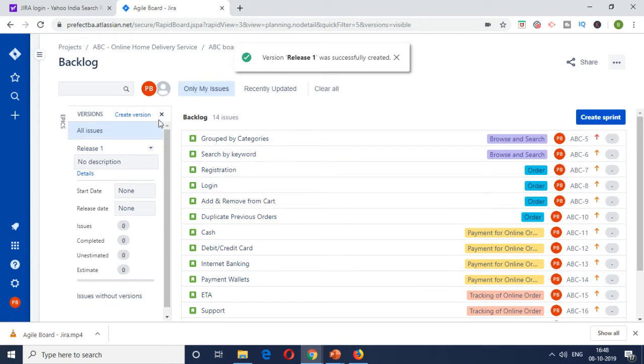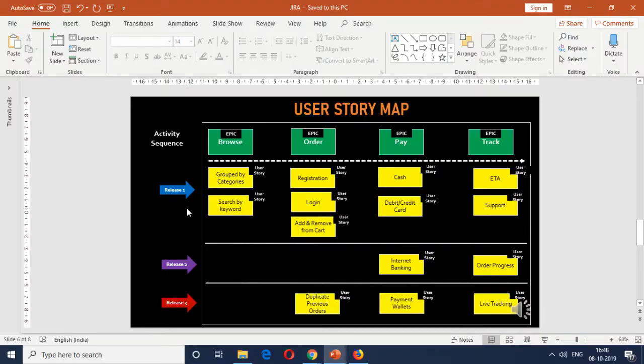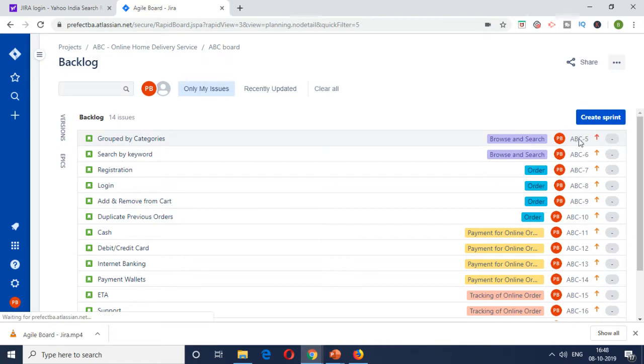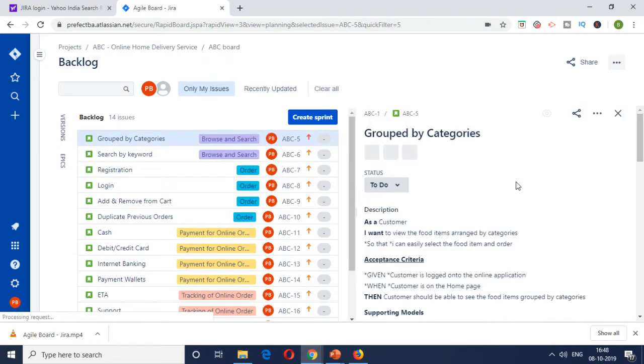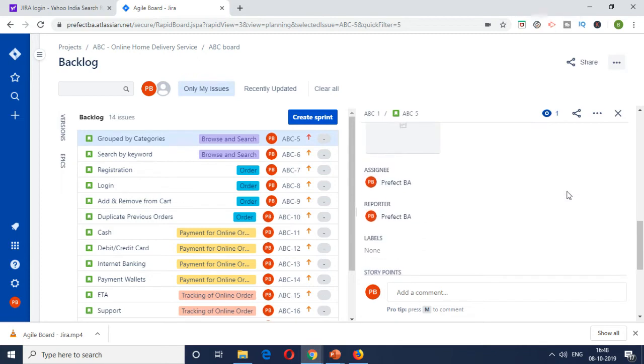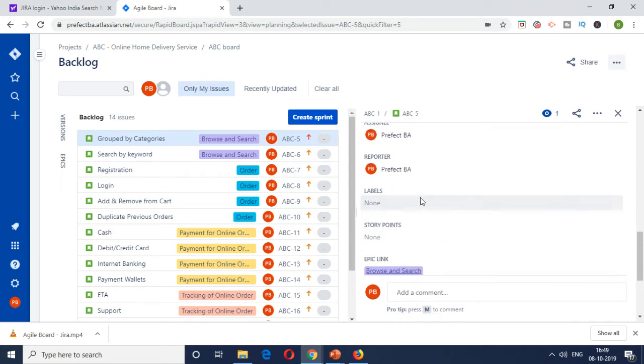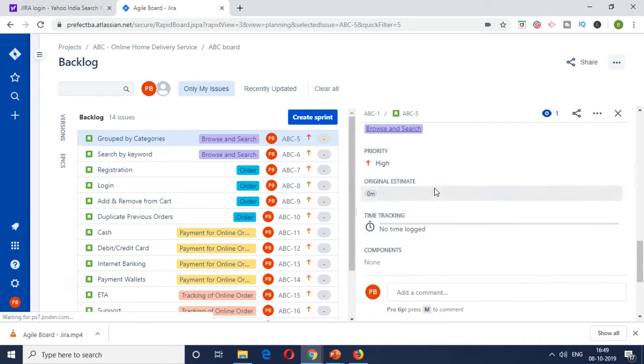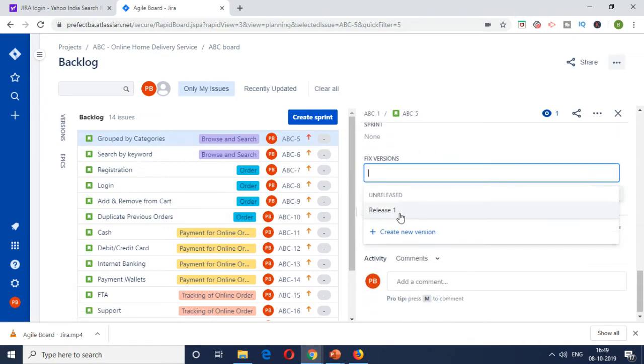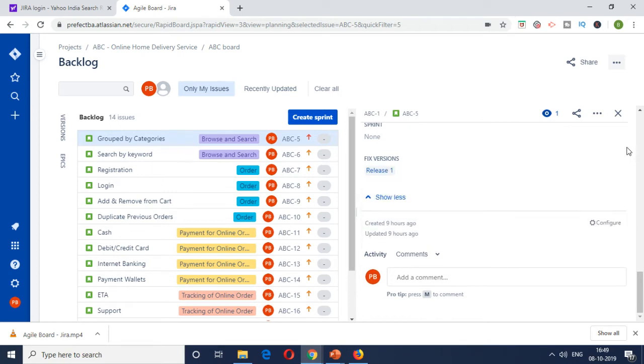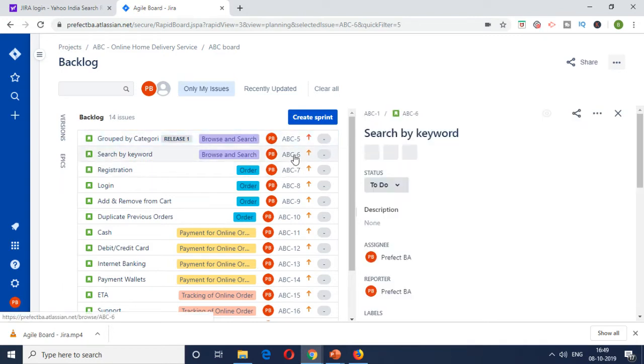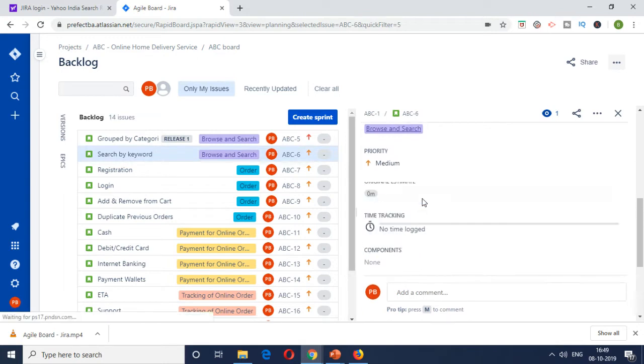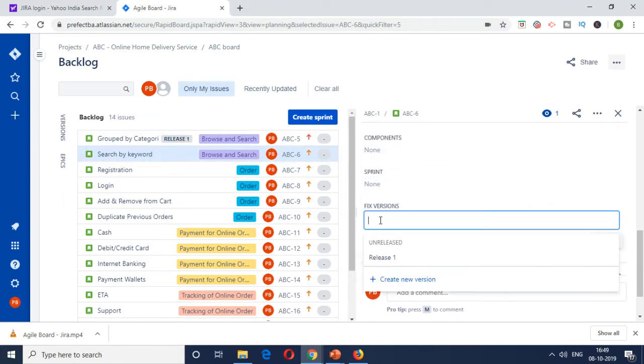So the next step is to map the user stories according to the release one. So group by category, search by keyword. So these are all release one items. So how to do the tagging is go to the user story. So this is the one which we had written earlier. And then there would be a field called fixed version. So here, go and tag it to release one. So that's it. So this is tagged to release one. So similarly, I'm going to do it for the rest of the items in our user story map so that it's all tagged.